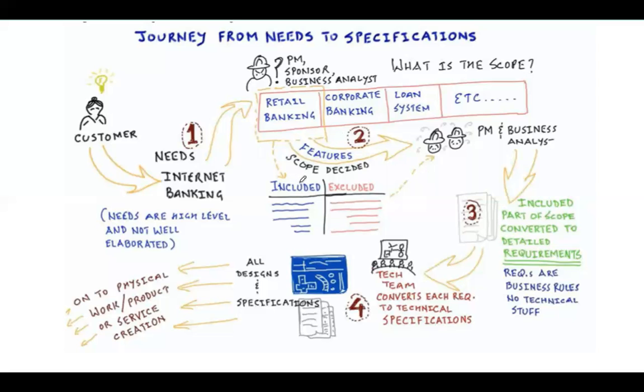we can decide what we're going to include and exclude based on the features or requirements that the stakeholders have. So the requirements analysis is going to be quite important. And this information, what's included and what's excluded, is going to be contained within the in-depth project charter. It's a very rough sketch of the boundaries of the project. All this goes into scope analysis, and it's converted into detailed requirements. So you might require a yellow banner on the login, and so on. These kinds of things